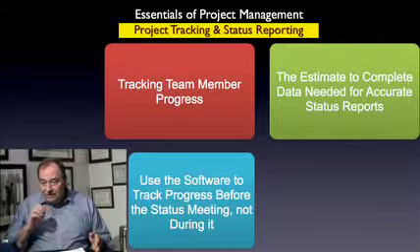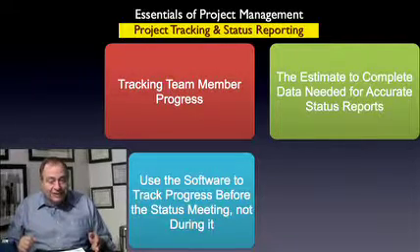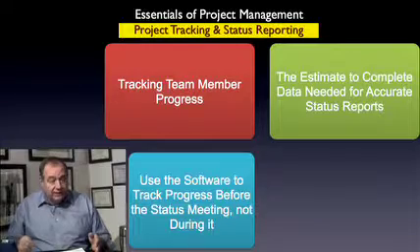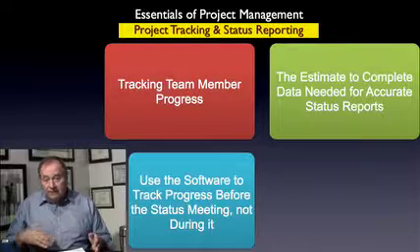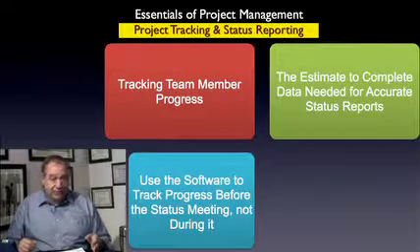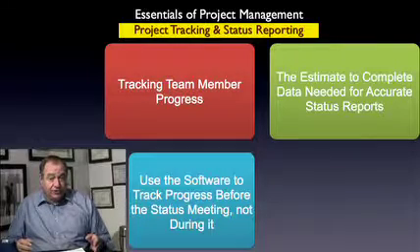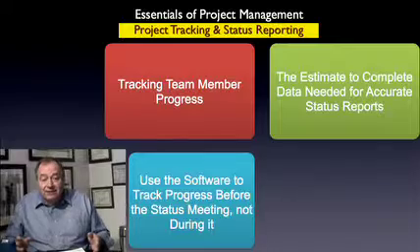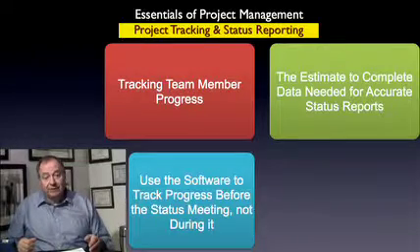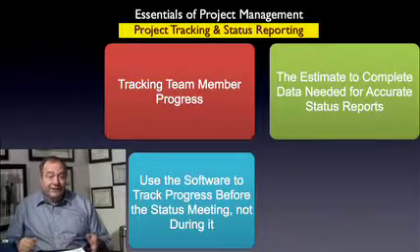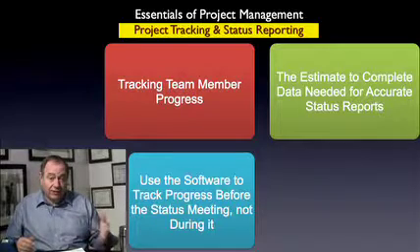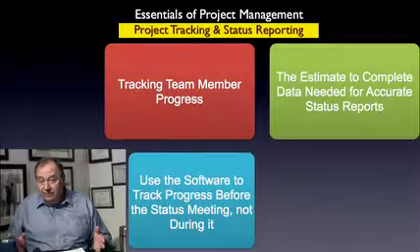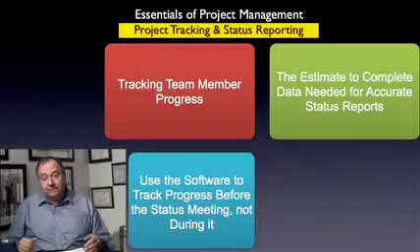And note that we're not asking for a long status narrative here, simply the two numbers. So a person's status report in a voicemail could be, "This is Jim, I worked on task number 7, I did 12 hours this week and I estimate there are 60 hours of work remaining." That's enough, that's it. Could go on a sticky, or we can have fancier reporting.